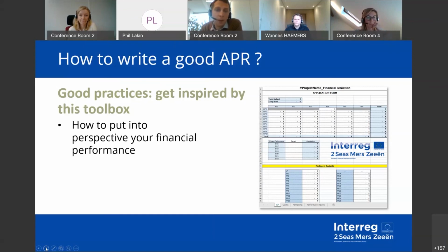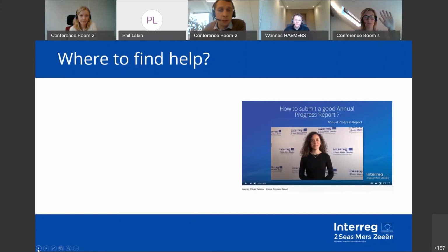per partner at project level. It also helps the project, and especially lead partners, to monitor the 20% flexibility rule. As you enter figures from the claims in the remaining tab, if you get close to the 20% flexibility rule, or if you exceed it, some cells will be highlighted in red, etc. So it helps monitor this rule, and it also gives you the performance review of your project, which is linked to one tab of the APR on which you have to comment on your performance and calculate it as well. So that was it for the...